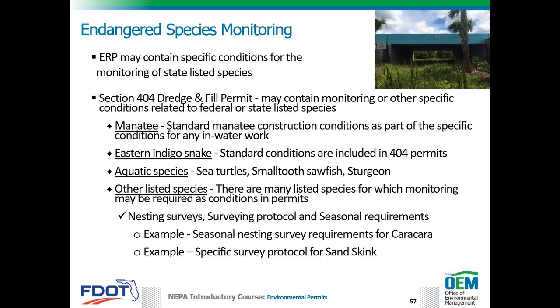These surveys have a specified seasonal requirement, nesting requirements, and survey protocol, so it is critical that the contractor have qualified observers on their team that can perform the species survey using required protocols. Examples include Audubon's crested caracara seasonal nesting survey requirements and sand skink survey protocol.